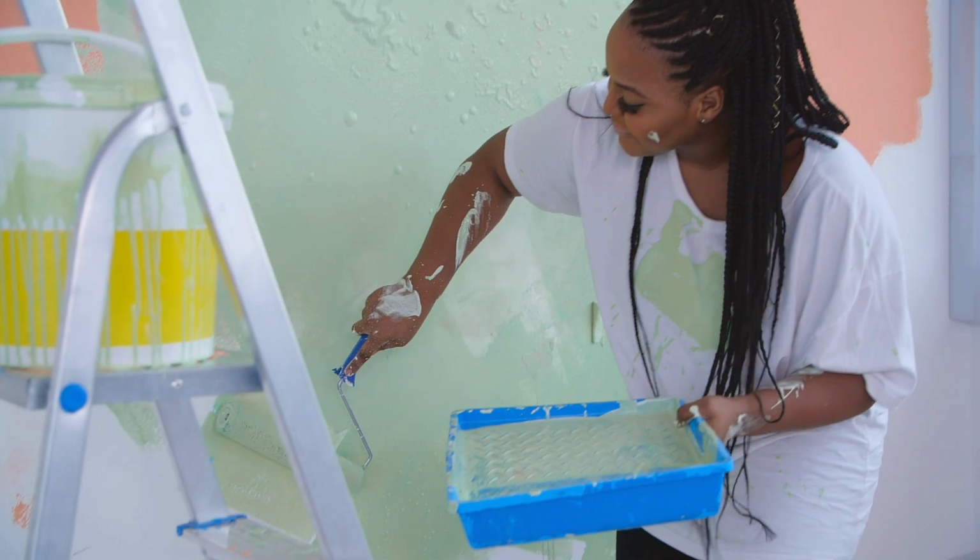When we put together a schedule of works for our projects, the way we tend to approach it is generally we look at the house and we look at what it is that we need to do pretty much in the whole house. For example, we need to redecorate the whole house, we need to recarpet the whole property. It may be that the whole property is going to be rewired, a central heating system is going to go in. These things apply to the overall whole building, and pretty much throughout all the rooms these things are going to be done. So we're going to have radiators pretty much everywhere.